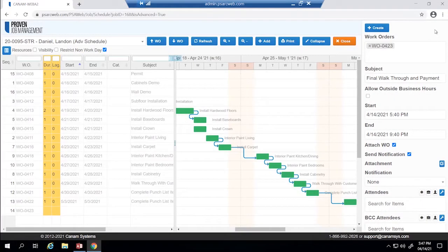You can now define the expected start and end time of this scheduled work order. The time range entered in this area is reflective of the amount of time you anticipate for the scheduled work order or milestone to be completed. To help cut down on data entry for timeframes, within your company settings, you do have the ability to define a default appointment length time. For example, if I expect all scheduled work orders or milestones to generally be 4 hours long, you can define